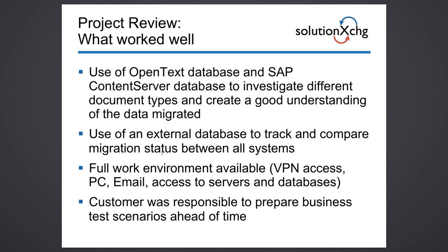And then we actually had that situation. We moved the document and then it was deleted just 2 days after migration. And somebody said, well, where's this document? I can't find it anymore. Well, it was correctly deleted. It came over correctly and was correctly deleted. We were able to prove that very easily with the database we were maintaining.